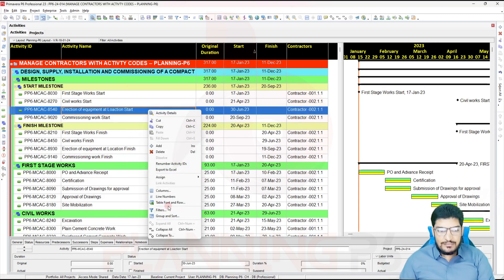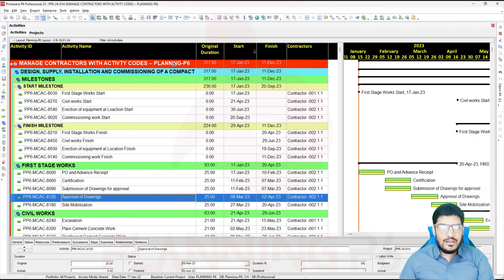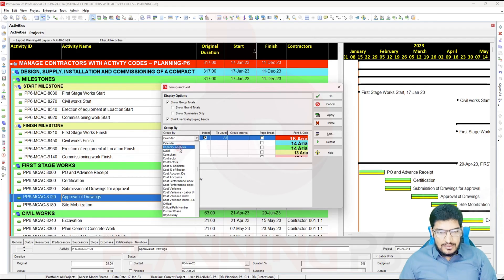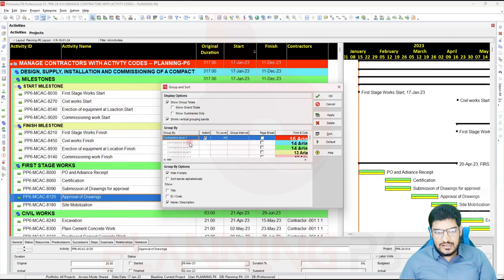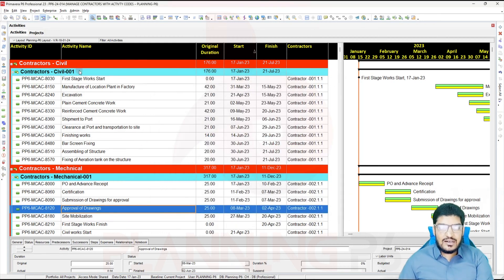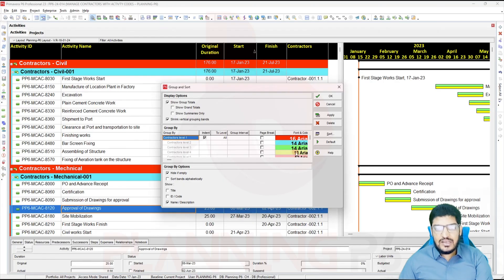First, how can I see it? I will right-click — the grouping and sorting option is there. You can go by this way: Group and Sort, or directly from the Group and Sort option. Here whatever the name of the code you have prepared — we prepared it as 'Contractors' — so click 'Contractors,' Apply, and OK. Now you can see: under 'Contractor Civil,' what is there — that's 'Contractor Civil 001.' Under Civil 001 you can see the different codes, and you have the option to customize by this way.